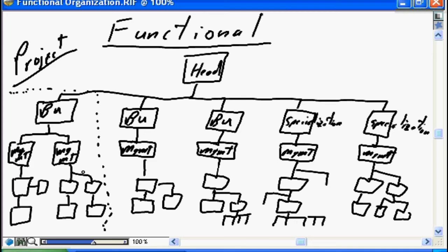Because we're operating in a functional area, the project itself is traditionally going to be limited to that particular business unit. Obviously, a project needs a project manager, so this line manager gets assigned project management responsibilities as well. And that's one of the key components to project delivery in a true functional environment, is an existing manager takes on the responsibilities of project management.